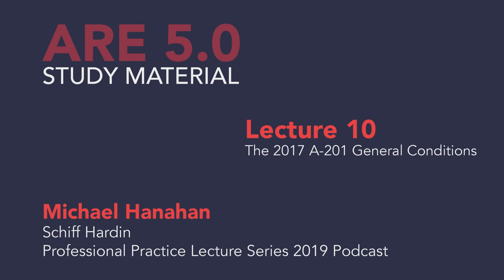Okay? All right. Subcontractor. Subcontractor with a capital S. So anytime the word subcontractor is used in this document, it includes a person or entity who has a direct contract with a contractor to perform a portion of work on the site. So contractor enters into a subcontract with the electrical subcontractor. They are a subcontractor with a capital S. The entity that provides the conduit and the electrical wiring that electrical subcontractor buys is not defined as a subcontractor under here. That would be a sub-subcontractor.